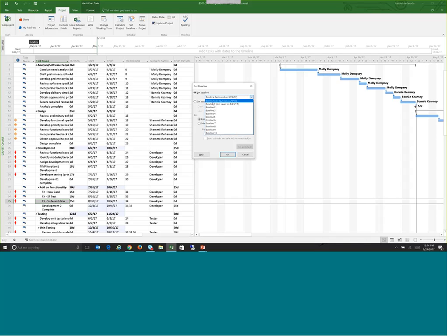Or you might have a situation like this where it was pretty fleshed out before we started working, but now we have this new requirement that's come along that's going to push out the schedule. When I added this new task and the 25-day duration on it, you can see here the highlighting of everything else that was impacted by that.